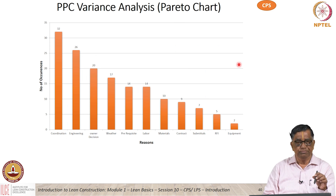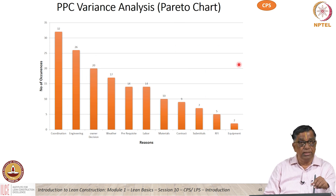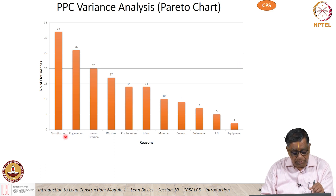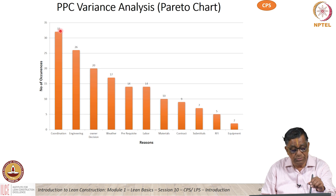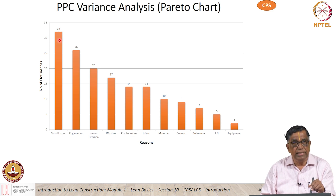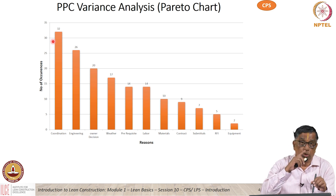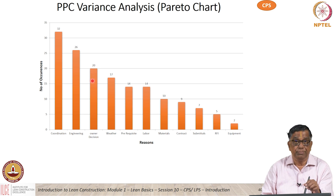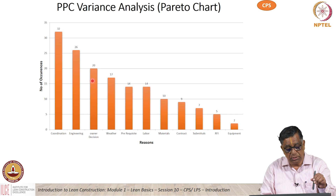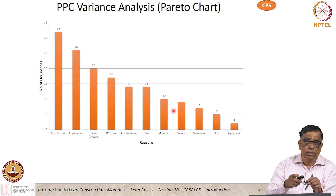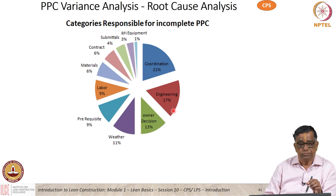Consistently 100% PPC is not good; consistently low PPC is also not good — that means you are not able to plan or perform. Something around 80 to 90% PPC consistently is what we are quite happy with. When something is not being done properly, we identify the reasons — for example, arranged in decreasing order of magnitude. Here we have coordination problem, design problem, owner decision, prerequisites not done, and so on. How many times does a reason occur again and again? If coordination is the main problem occurring so many times, I need to see why my coordination is not good. This Pareto chart gives the order of importance of the various problems.